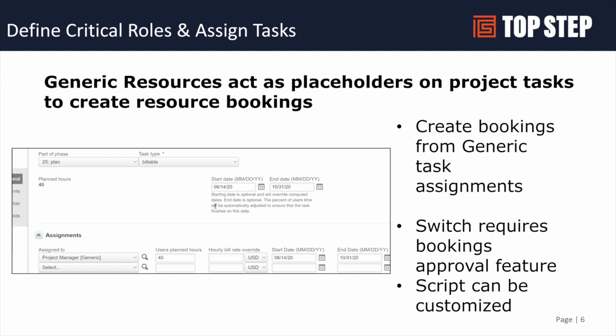And the benefit of these custom fields is, within a task, there's an overall start and an overall end. But then you could have a project manager, an architect, and other roles on the same task, and they may not all follow the same date logic that's within the task. If they can follow the same date logic, that's great. More often than not, we see it doesn't follow the same logic. So for those scenarios, we've been creating some custom fields at the task assignment.